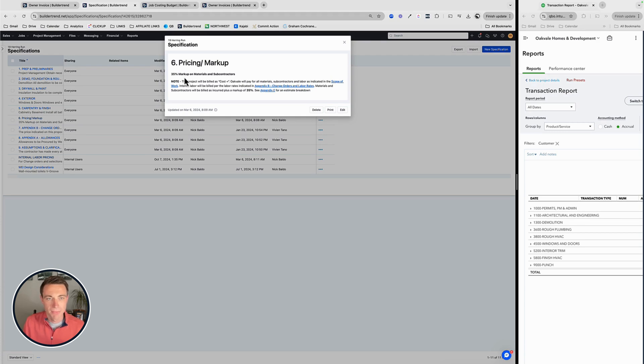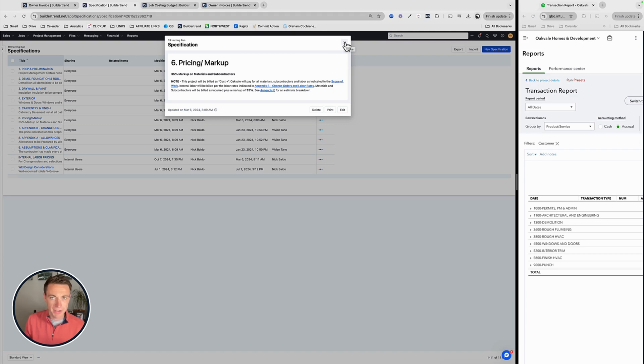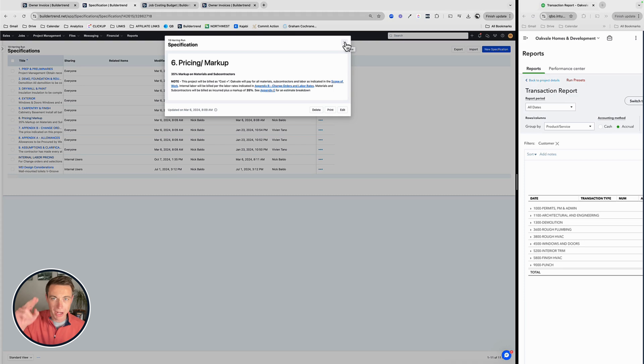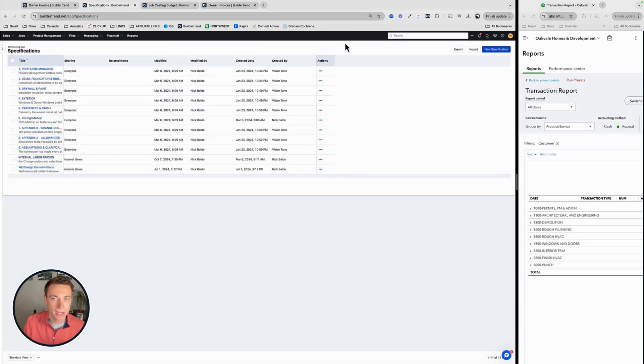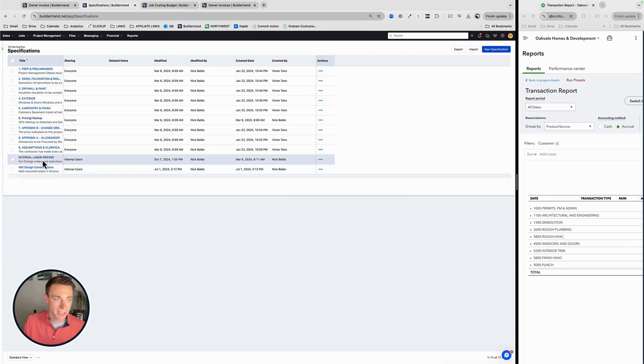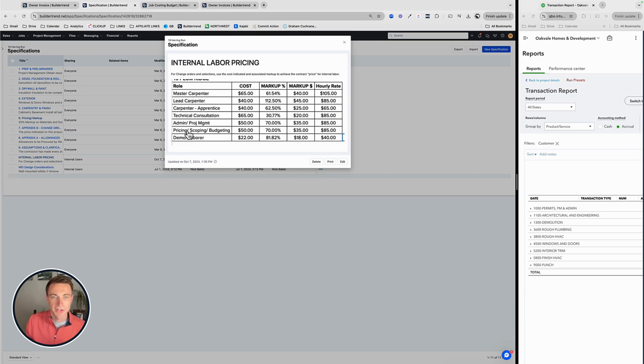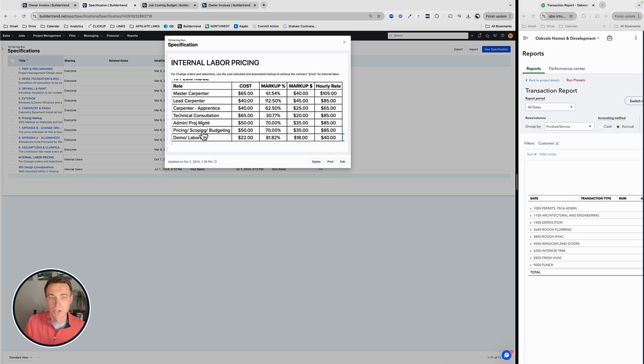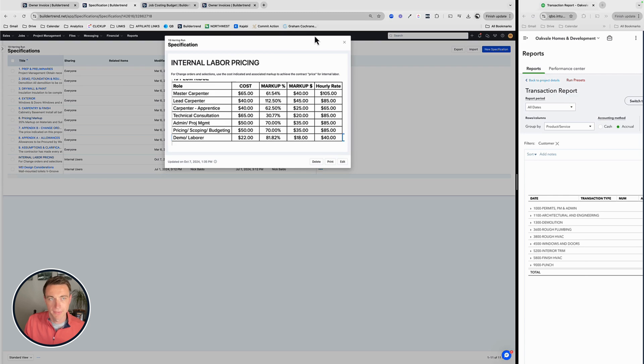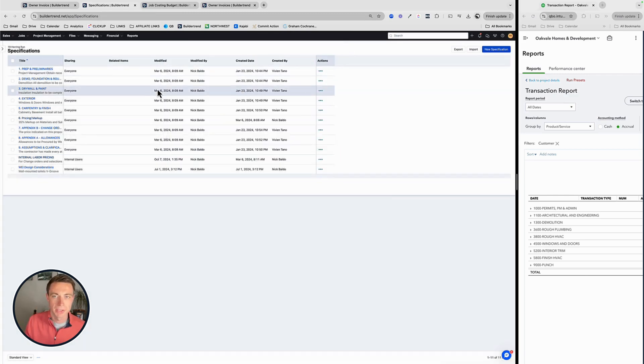In this case, I've got my 35% markup on materials and subs. And then the other thing we do is labor. Labor is a little bit interesting because what we're doing with labor is we're telling BuilderTrend what my cost is for an hour of labor. And then we need to mark it up to get to our price. And so labor is a little bit different. I've got these roles that I use, my master carpenter, lead carpenter, et cetera. And the actual human being is going to record the time clock, but I'm going to, or my VA is going to understand who that person is, what the markup is going to be to get from our cost to our hourly rate. I'm going to show you all of this.